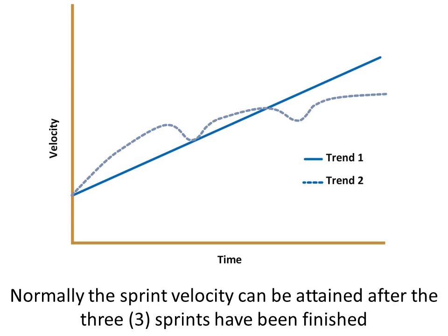the theory is that over 3 or so sprints, the team usually reaches the optimal velocity, which is something that they can continue on and hopefully reach a stable state to produce over an extended period of time. So it's more like an average velocity that you establish over 3 sprints that becomes your target velocity moving forward.